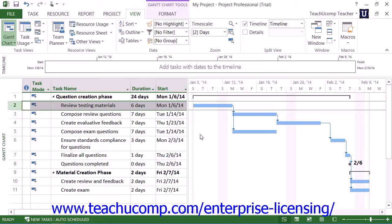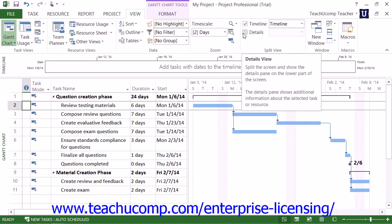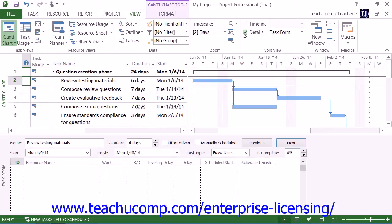To allocate resources to tasks, you need to select the task items. You should switch to the Gantt chart view of your project file when assigning resources, as you can also see changes to task durations in this view. A helpful feature is that you can view resource assignments for selected tasks in a separate task form within the Gantt chart view. To enable this, click the View tab in the ribbon and then check the Details checkbox in the Split View button group. You will then see the Resource Form view appear in a separate pane at the bottom of the window. Next, use the drop-down to the right of the Details checkbox to select Task Form, which will change the bottom pane to display the Task Form instead.